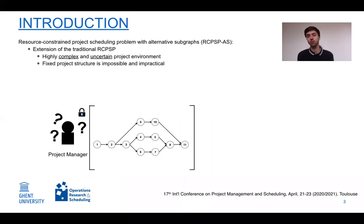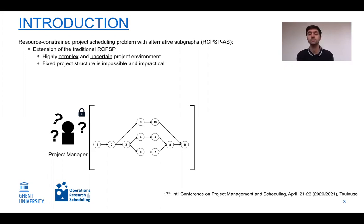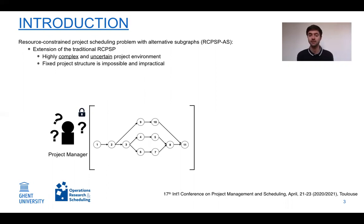However, this traditional problem is characterized by a multitude of assumptions, and therefore in recent years many researchers have investigated extensions to make it more practically relevant. They investigated flexible resource profiles, activity splitting, but also the existence of multiple modes. In multi-mode RCPSP, each activity has different execution modes — a unique combination of activity duration and resource requirement — allowing a trade-off between cost and time at the project level.